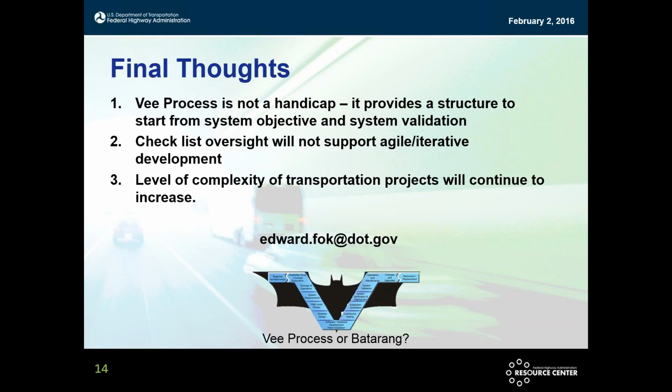So the question is, how do you use the priority of the requirement in Agile development? Well, what we found is we'll do feature-based tests. The requirements are a many-to-many relationship to the backlog. One example I'll give is you might have the requirement to log the data for everything you're developing. That drives every component that's in development, so doing feature-based testing helped us show that.